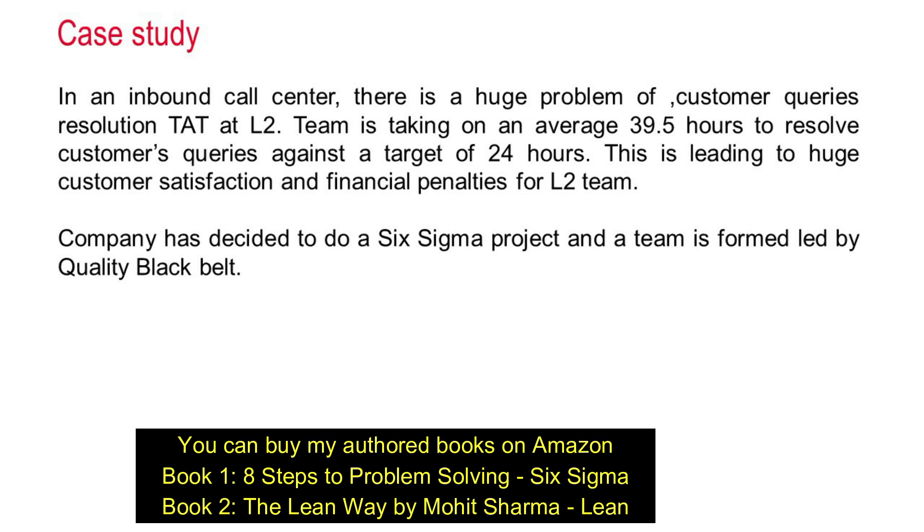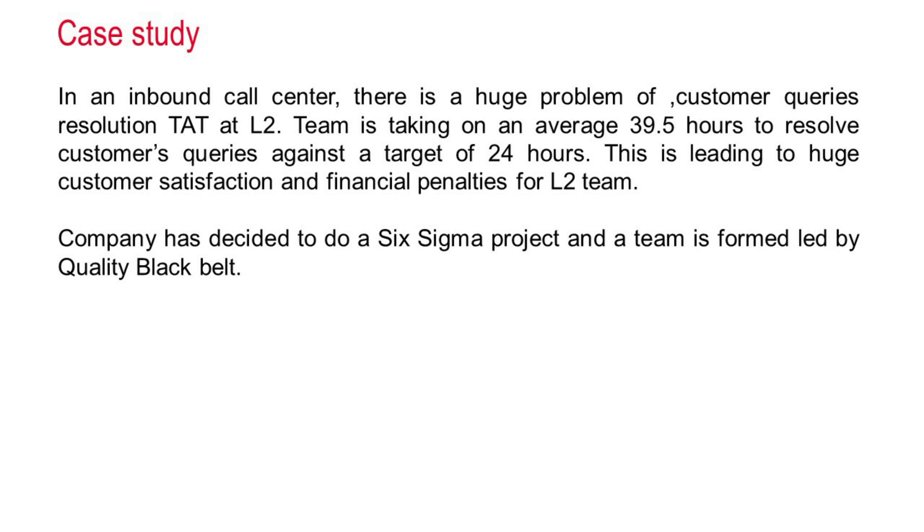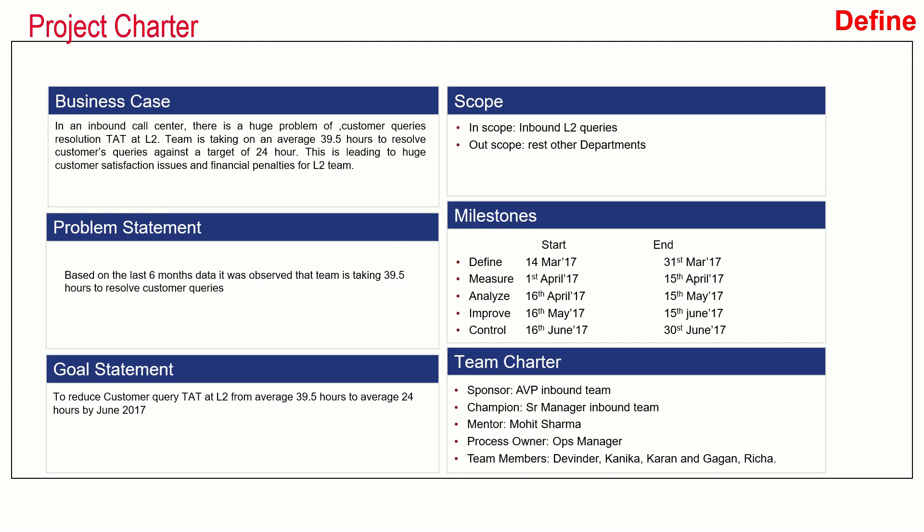The first thing the team did was to create a project charter. The project charter has six elements: business case, problem statement, goal statement, scope of the project, milestones, and team charter.